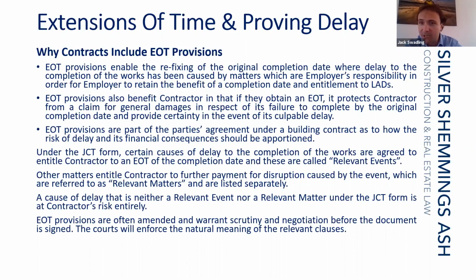It may well be the case that the liquidated damages rate that has been agreed has been carefully negotiated and capped in a way that wouldn't apply if the employer had a general right to bring a claim in damages at common law for the failure to complete by the completion date, and this could potentially expose a contractor to greater liability.